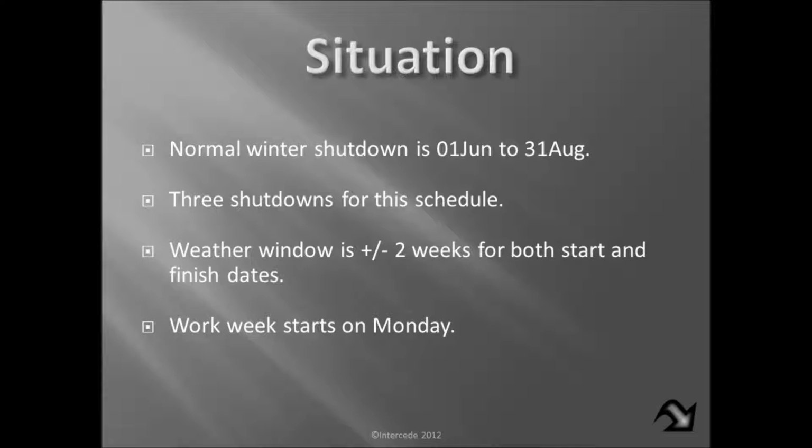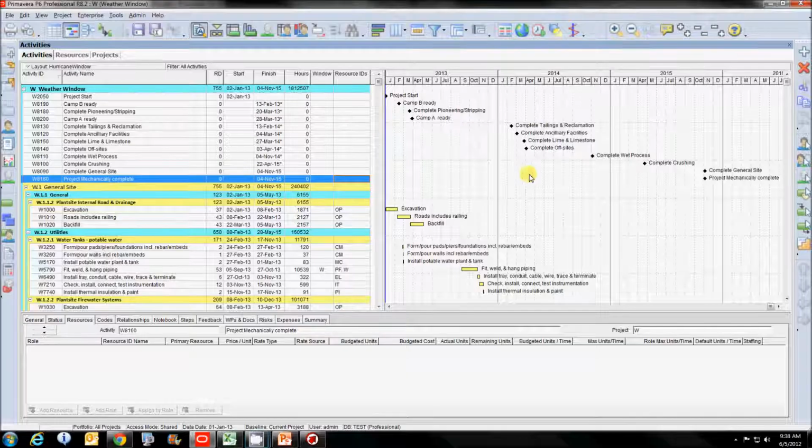Another thing I found to be important is that my work week starts on a Monday. So any of my start dates, and you'll see this when we construct the weather window, will have to be on a Monday, and any of my finish dates will have to be on a Sunday. So let me show you what I did.